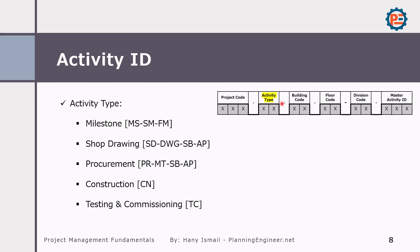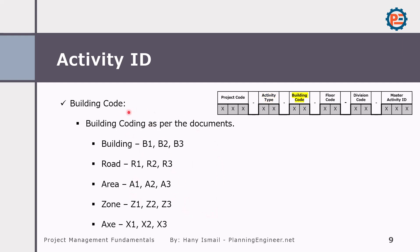The activity type tells you whether the activity is a milestone, shop drawing, procurement, construction, or testing and commissioning — with abbreviations used for each. The building code is very important so you know which building you are looking at: building one, building two, building three, or if it is a road — road one, two, three — or an area, zone, or whatever, according to your project situation.